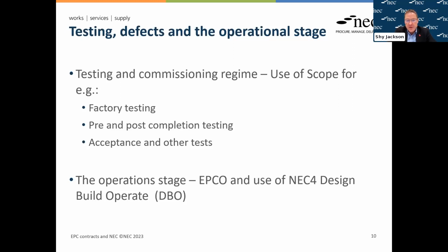And then I thought I'll mention very briefly another version of EPC, which is what we call EPCO, which is where the contractor continues to operate the plant after construction. This does require a bit of thought about how the payments are structured. There can sometimes be interface issues, but if you're looking to do that, then the NEC 4 design and build option is very suitable, and sometimes it is just used as a separate O&M contract.